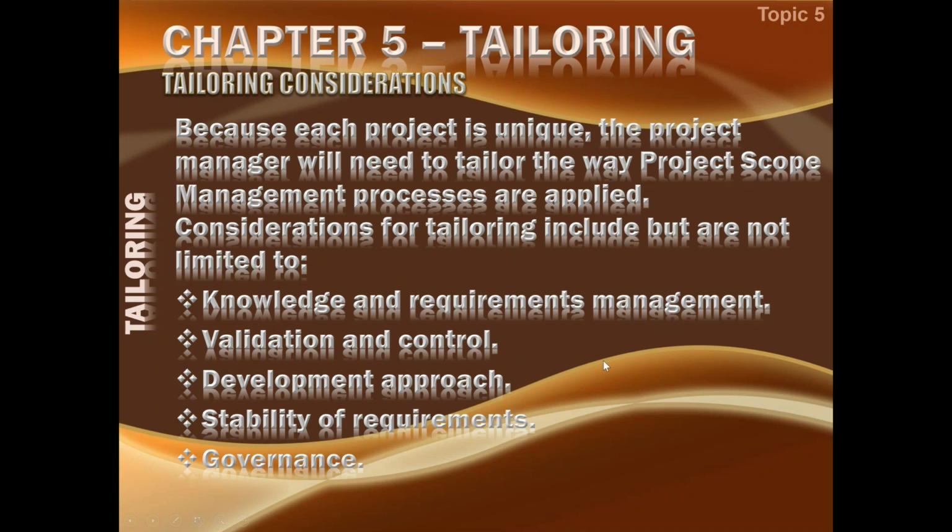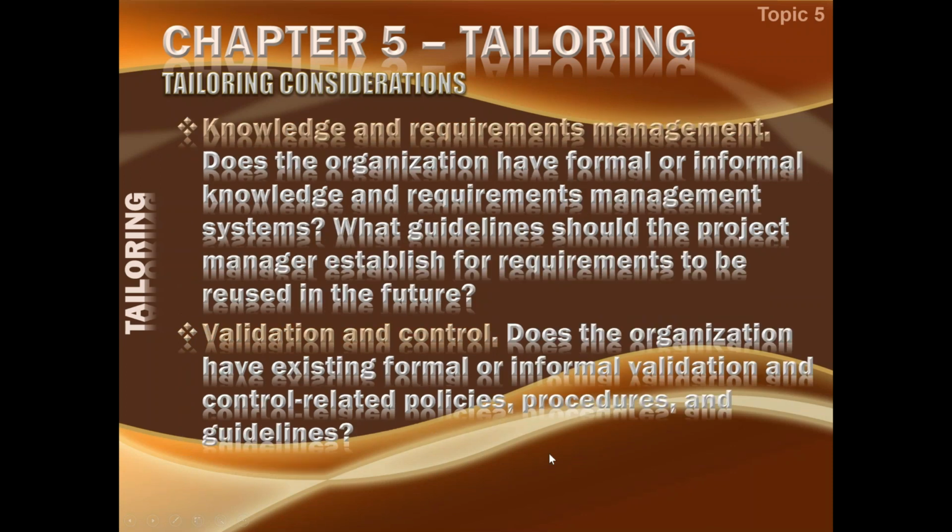Validation and control procedures in your organization and your requirement may be more or less than what is defined in PMBOK. Development approach of your organization, stability of the requirement, what kind of project you are doing and how stable are the requirements. If the requirements are not very stable, then probably you should be going for an agile approach. If requirements are pretty much stable, then you probably can go for a predictive approach. Then what is the governance mechanism in your organization? What are the good governance practices? How do they ensure that the requirements are being fulfilled or not? So that would also govern how you tailor your specific requirements.